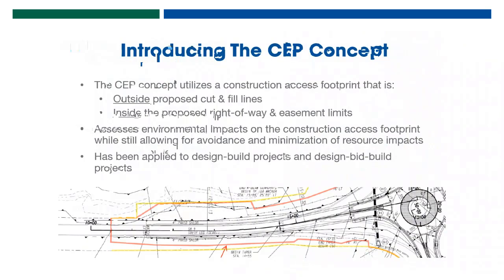Agency consultation, which, if you can recall the flow chart, is happening early, prior to right-of-way. Again, that's to confirm with the lead federal agency, if it's FHWA and/or the Fish and Wildlife Service and other agencies, that we're going to get the permission we need in order to move forward with the project before we buy right-of-way. We don't want to buy the right-of-way and then be told we can't do the project. So this is an important thing to get under our belts prior to authorizing that right-of-way.